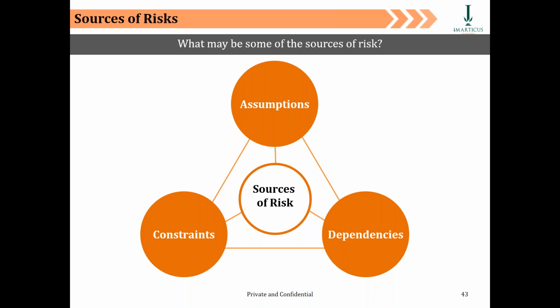So what happened here? My inability to socialize the solutioning perspective with the user in the initial stages of the project, because I took an assumption that whatever solution we are building, eventually we'll be able to create detailed training programs and all that stuff, and we'll train the user. So what is the big deal? My idea was to create a solution and then train them. Unfortunately, it went the other way around.